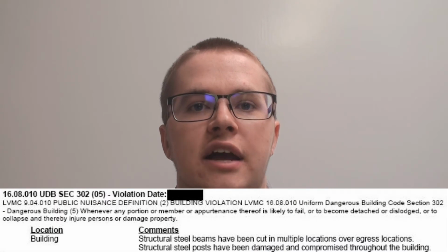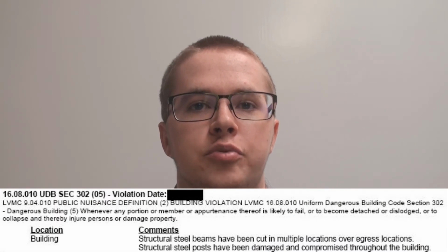The most common violations requiring additional consulting are violations concerning areas of the building that are deemed dangerous structurally. In this case, it will be necessary to hire a structural engineer to assess the area of the building that requires structural approval. If the area has the structural engineer's approval, the building department will simply require that a letter be submitted alongside the plan submittal stating that the building is structurally sound. If the building does need additional structural work in order to be stable, then the structural engineer shall provide drawings and details depicting the course of actions necessary to solve the issues. Once provided, the sheets will be added to the plan set and cross-referenced as necessary. The full plans can then be submitted to the building department as a response to the NOVs. While this example only covers structural engineering, there are other professional consultants that may be necessary to respond adequately to NOVs, and their additional plan pages will need to be included in the submission also.